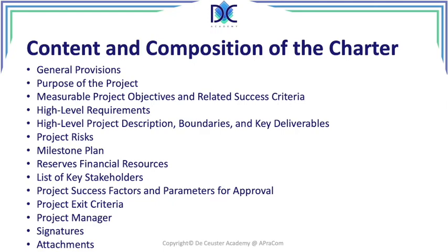So that's basically how we create a charter. A simple document, not too long, five to six pages maximum with everything. No large descriptions like I've seen from time to time. People have to be able to understand really what the project is about, what the criteria are, what the financial parameters are, and of course, who is dealing with the project, who is the sponsor, and who is the customer. So that was it about the charter.